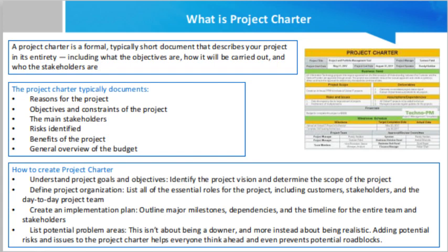Objective. List 3 to 5 objectives of the project. Be SMART: specific, measurable, achievable, realistic, and time bound. Scope. Outline the formal boundaries of the project by describing how the business may change or alter by the delivery of your project. Also note what's relevant to the scope of work and what is not. This is how you maintain better control of the project.